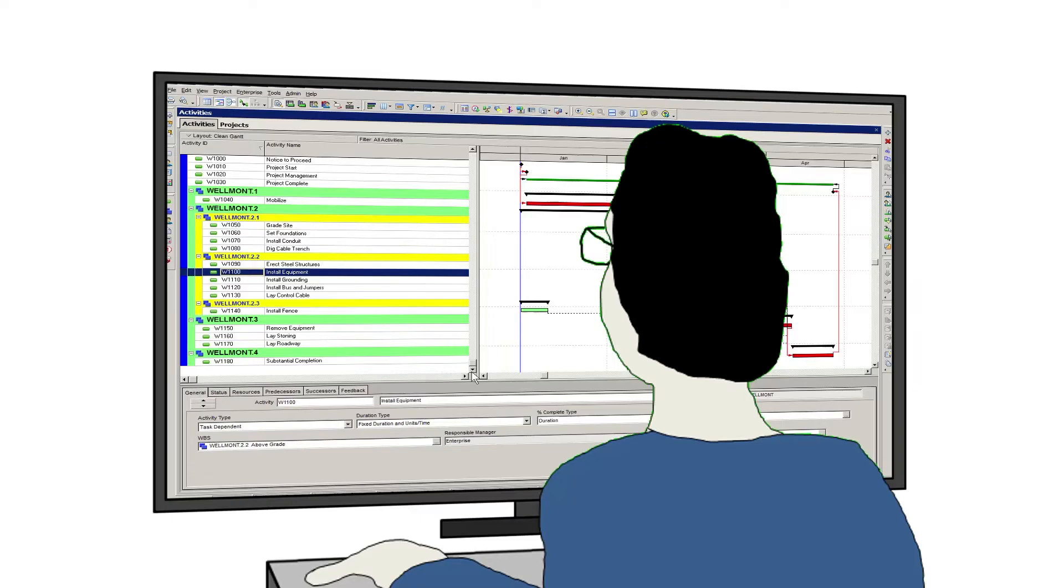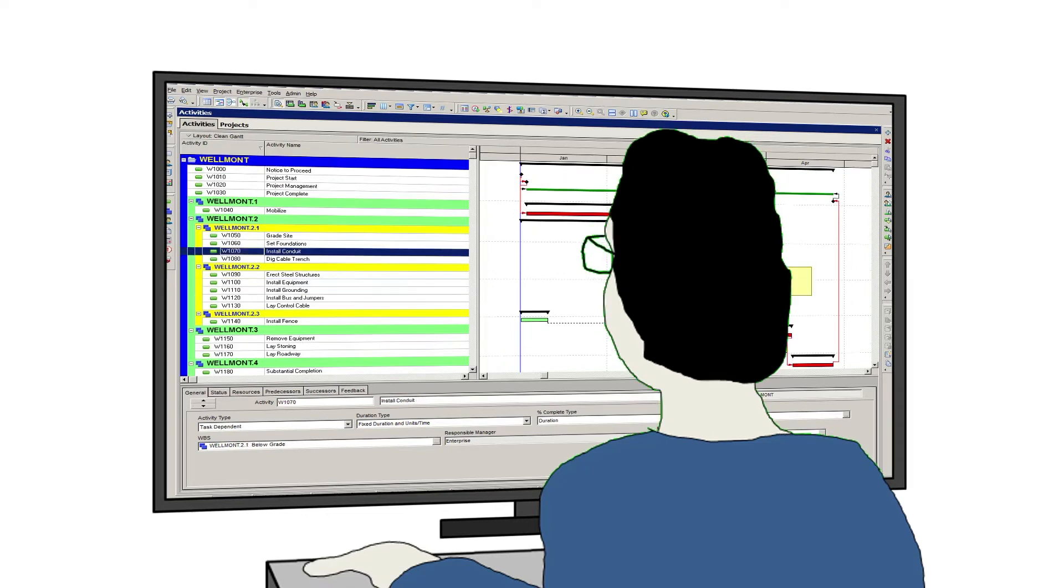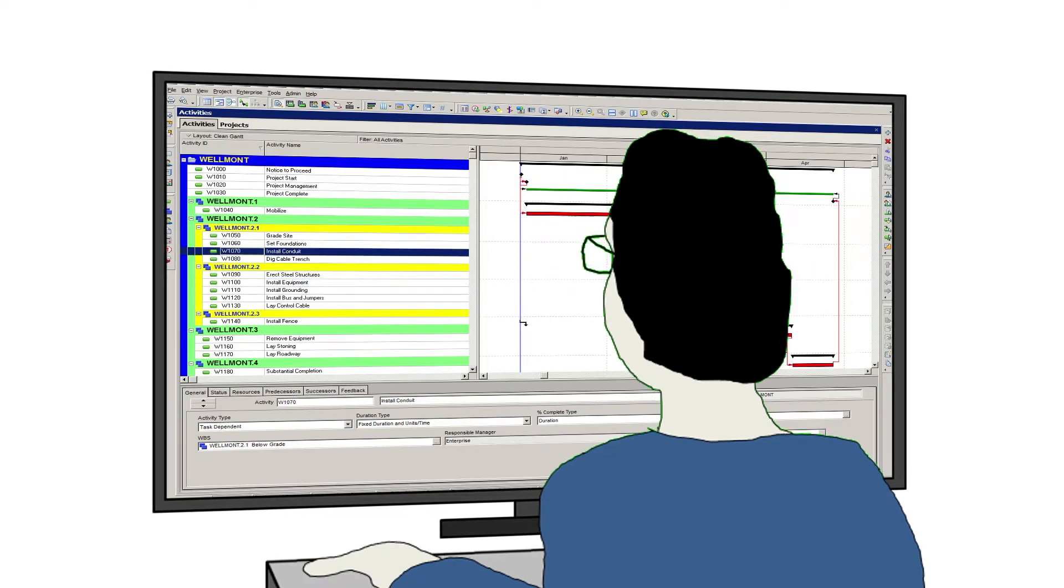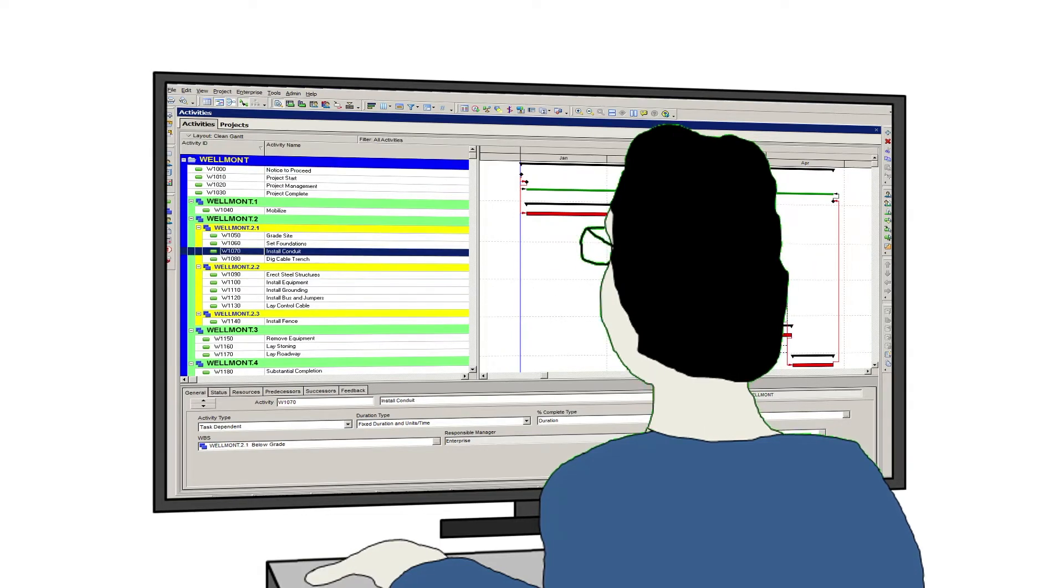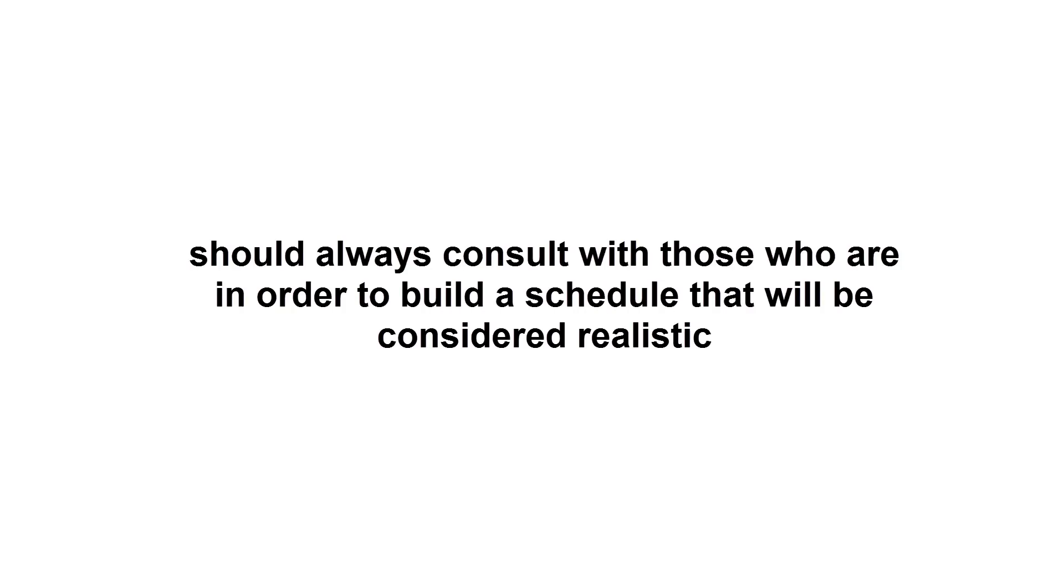The actual process of creating the most appropriate relationships between activities is the responsibility of the scheduler. The scheduler must be very familiar with the work that is being performed, or if not, should always consult with those who are in order to build a schedule that will be considered realistic.